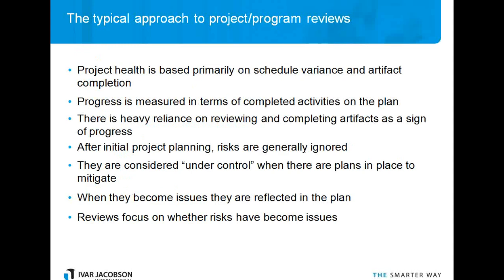So the typical approach that most organizations use in their project management offices or their governance organizations is to base project health measures primarily on schedule variance, and sometimes augmented by artifact completion. The way this works is that most project teams, at the beginning of a project, the project manager has to come up with a very detailed project plan. They go through perhaps some reviews, and eventually it's baselined, and then they're measured against that plan.